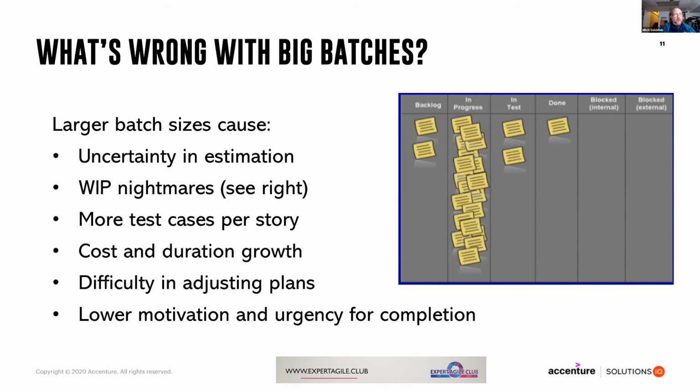This is outside the scope of this talk, but when people talk about WIP limits, this is to prevent this situation from happening, where we have things piling up in progress and not getting out. Work that does not get out to the customer is dead weight. It's what we call inventory waste in a software sense. The work that's in progress has no value. It only has value when it's in that done column and it's being consumed.